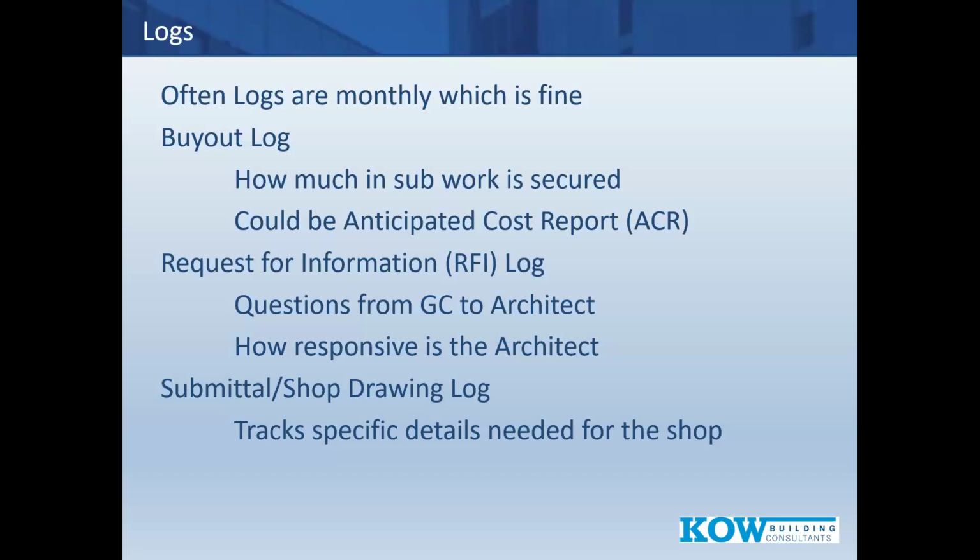Submittal or shop drawing log. This tracks the specific details needed for the shop. I will say this sometimes gets confused out there, I've noticed. A shop drawing is not produced by the architect. A shop drawing is produced by the shop, who's going to make that specific thing very, very definitively, very detailed. And the architect needs to say approved.